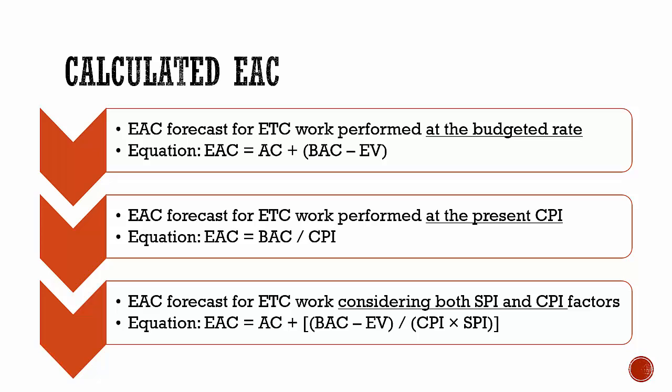The third EAC forecast considers that the ETC work will be performed at an efficiency rate that considers both the cost and schedule performance indexes. This method is most useful when the project schedule is a factor impacting the future effort. There are also some variations of this method that take the CPI and SPI at different weights, for example 80% to 20%.